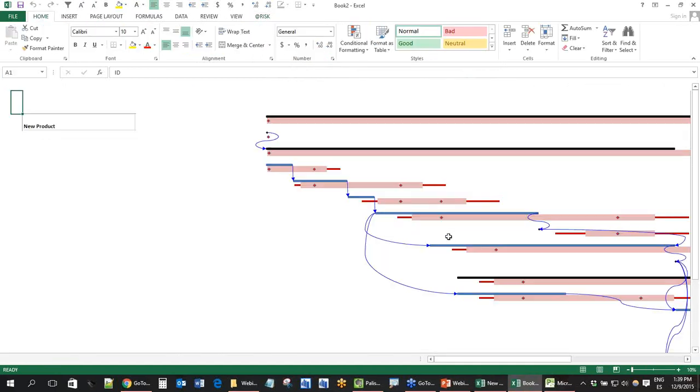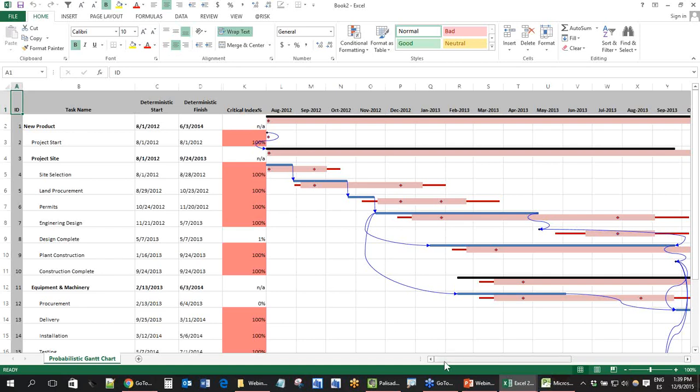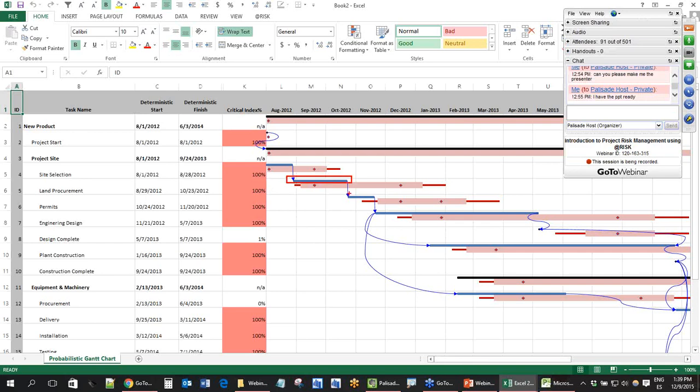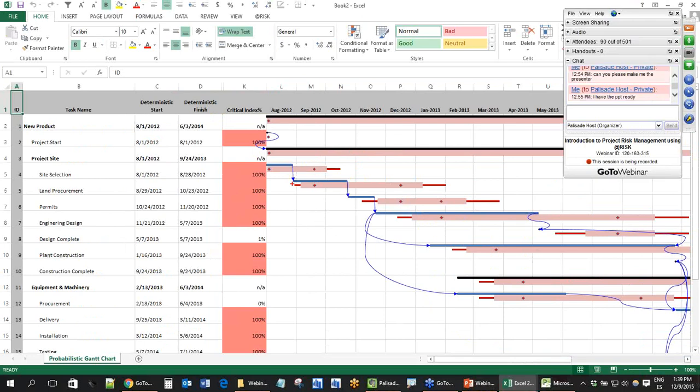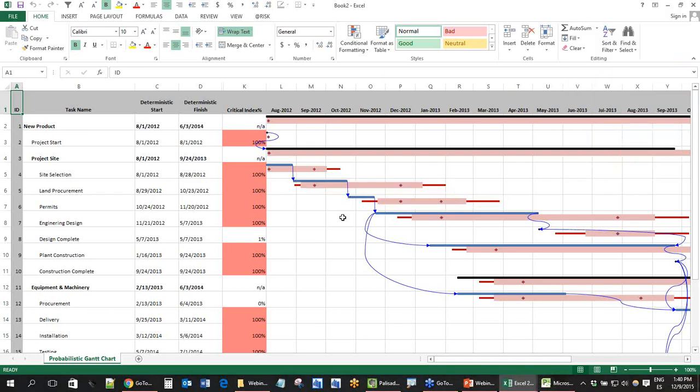So this is going to generate a report such as this that's showing you first what was the original one, right? You see in blue, that was the original. And starting with these little red pipes here, you see the minimum and maximum of the duration of the task. You see this is, if I'm not mistaken, P10, P90, this is the first interquartile, the third interquartile, but basically showing how volatile is each task compared to the ones that you have originally.